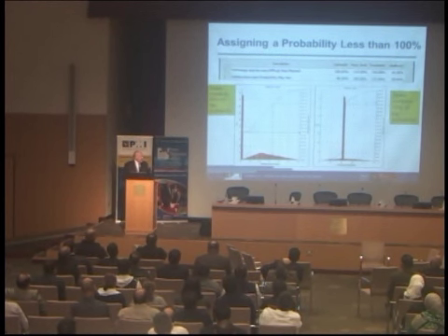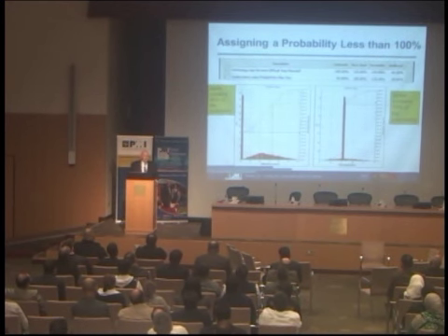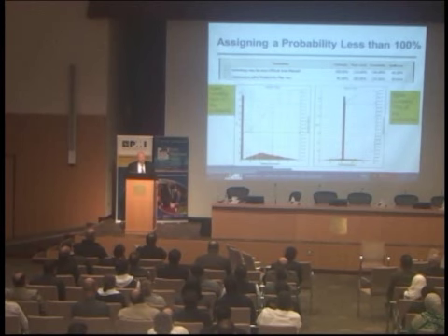Okay, and the same thing here. I've got a 30% risk, so this spike includes 70% of the probability, and like that. And some people say, I don't like those distributions, but they're right. They represent both probability and impact. With 3-point estimates directly on activities, you don't have a concept of probability of the risk not occurring. But I do. But still, each one of these only has one risk assigned to the activity.